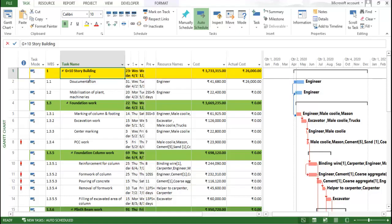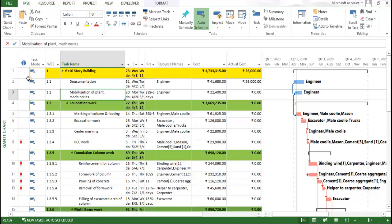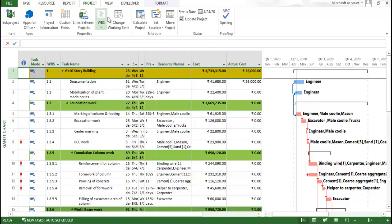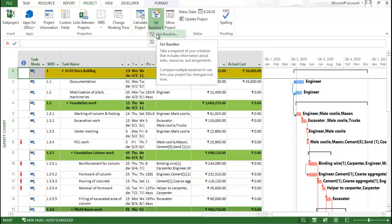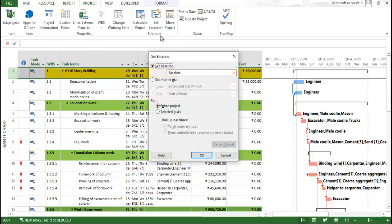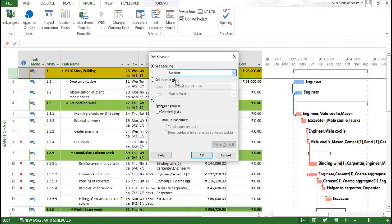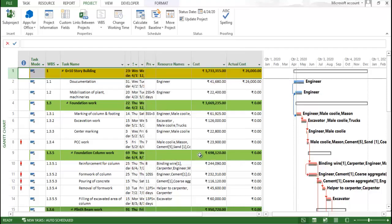To assign a baseline, first select the particular task. Then go to the Project tab and click 'Set Baseline.' When you click on Set Baseline, it asks which baseline number you want to use — I'm selecting baseline number zero. It also asks whether you want to apply it for the entire project or selected tasks — I'm selecting entire project and clicking OK.